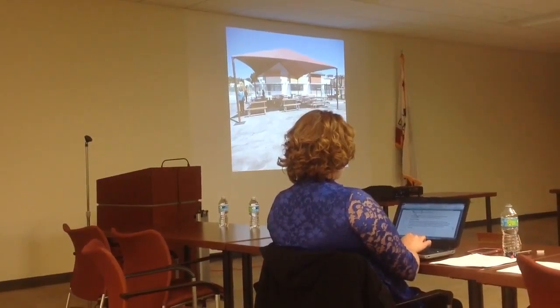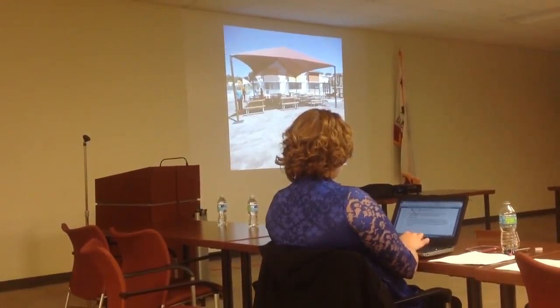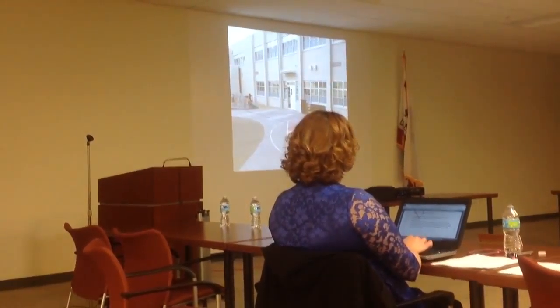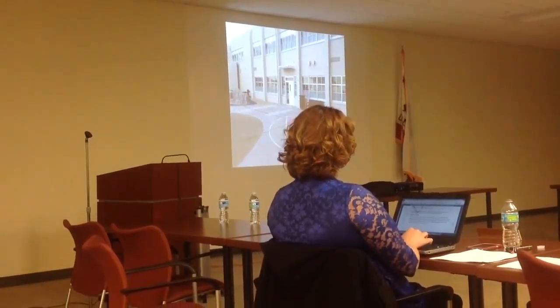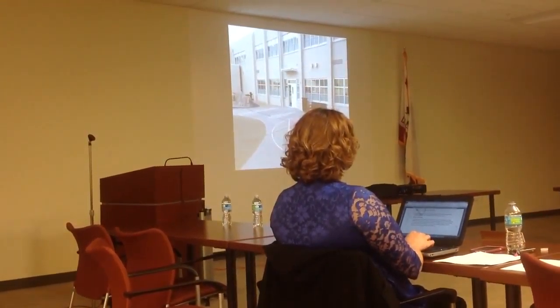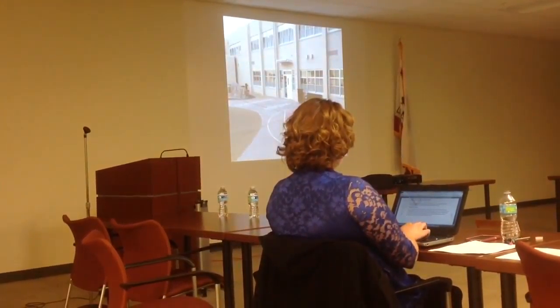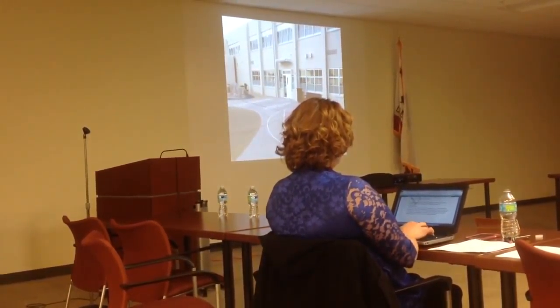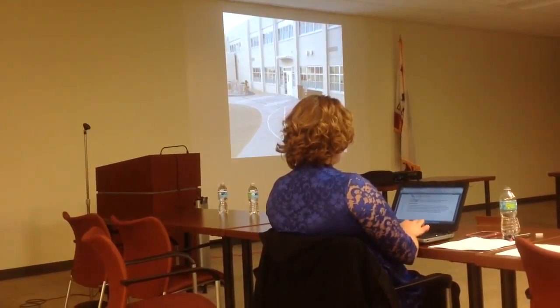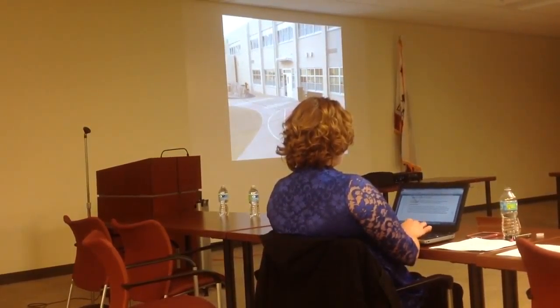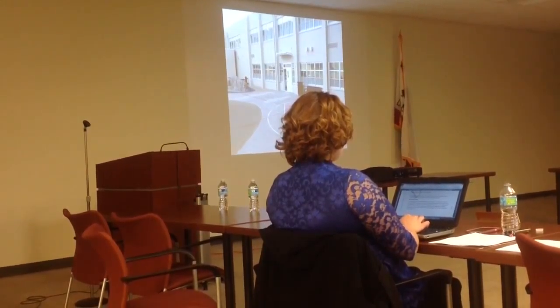Again, this is just another closeout project. Hardin Elementary, this project, we're trying to wrap it up now. Contractor's committed to final punch list completion by next Friday. School is actually reusing the spaces. We've taken down the temporary fencing, turned back over the kindergarten yard to them.